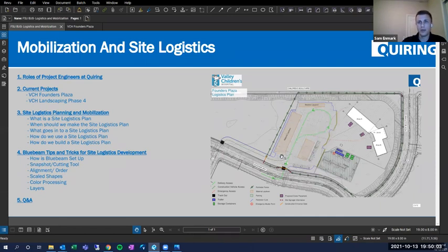So what we do is, okay, we've got this material laydown, but this is for bulk material that we're then going to move into the building and shake out from there. We want everything to have a spot on site, because what we don't need on this project is just-in-time deliveries. So we've got a large site that we've accounted for a lot of material laydown. But if you notice, what takes priority here is the access coming through here so that they can get up close to the building with anything that's being delivered that needs to go into the building, right?